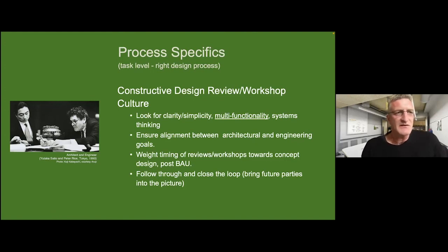Again, the timing of the workshops is really important. If it's too early, people aren't ready to make the leap into these solutions. If it's too late, then things are set in stone. So we found mid-semester, a couple of weeks after mid-semester, to be the ideal time. On a project, it's got to be somewhere towards probably the end of conceptual design and the start of design development, I would have thought.